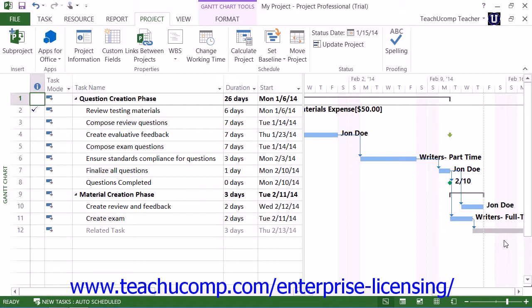Note that you must have saved at least one baseline copy of the project file to show earned value analysis results. You must also have accurately recorded the actual work and costs within the project file. In addition, you must select a status date so that Microsoft Office Project can compare the baseline values against the values recorded as of the status date.